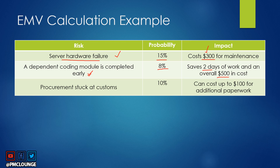Risk three is procurement being stuck at customs. There is a 10% chance of this happening, and if it does it will cost up to $100 for additional paperwork. So these are the three risks, each with their probability and dollar impact. In the Probability and Impact matrix you may already have the probability — if you also have the impact in dollars, this is how you calculate EMV.